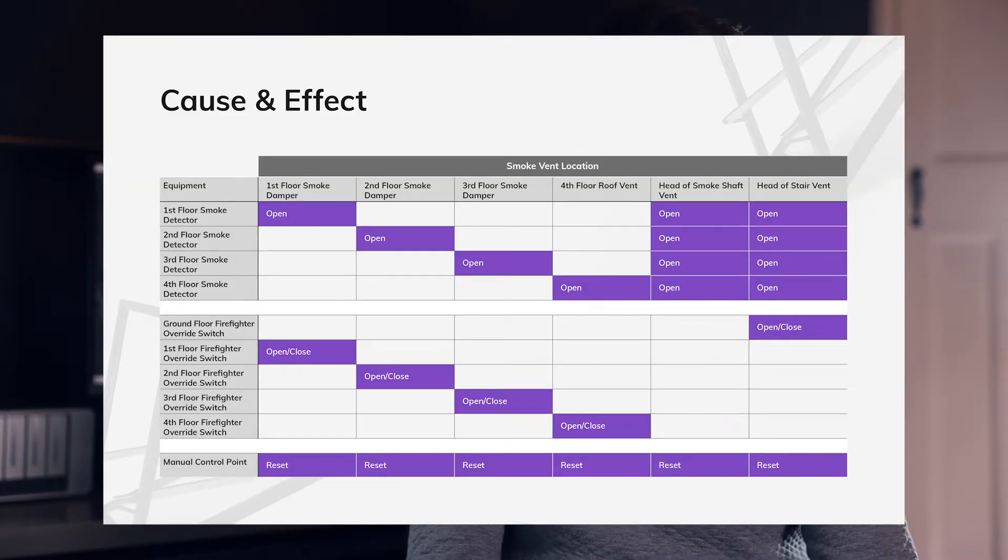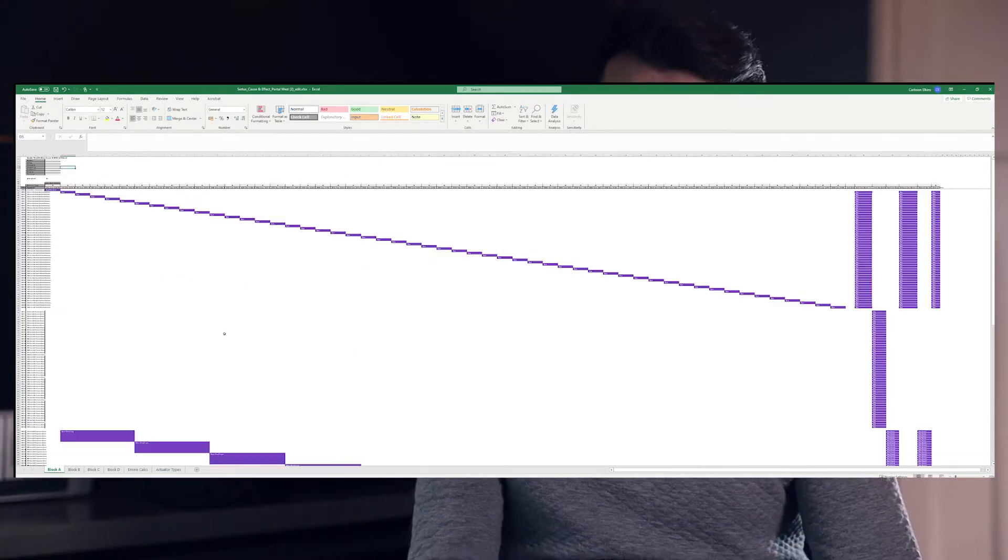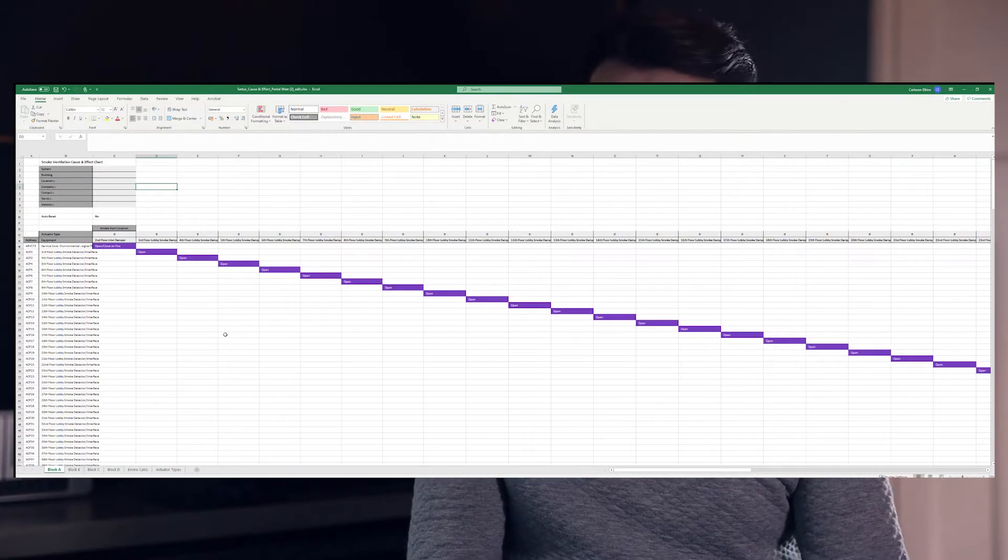When we're referring to cause and effect in relation to smoke ventilation systems we're usually talking about a chart. For small buildings they look something like this; for large buildings they're more like this. So as you can see, they go from very simple documents which anyone can figure out to exceptionally complex documents that require you to have an intimate knowledge of the project. By looking at the chart, whoever's commissioning or testing the system can tell exactly what it's supposed to do for every possible input, allowing the system to be tested to make sure it's working exactly as planned.